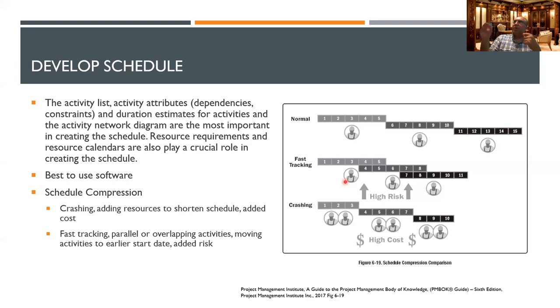So if you're late on building the house, you say, okay, painting guys, you're going to come in, flooring guys, you're going to come in also, the plumbing people are going to come in also, electrical people, they all come in, instead of only painting guys and then only the electrical people, then only plumbing people. You say, okay, he's just about finishing in 2 days, he's also going to start his work. So you bring them in parallel and there's overlapping, but there's a risk there.